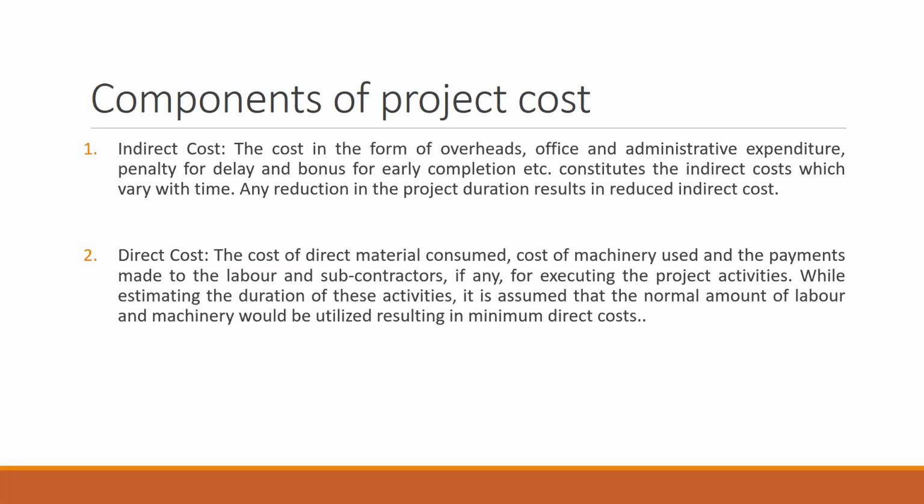Or maybe I'll employ more labor, so again the cost will be involved. Or the laborers might do some overtime, so again my overtime allowance will increase the direct cost. Also remember, the direct cost will also increase if I'm not able to complete my overall project in the given duration.